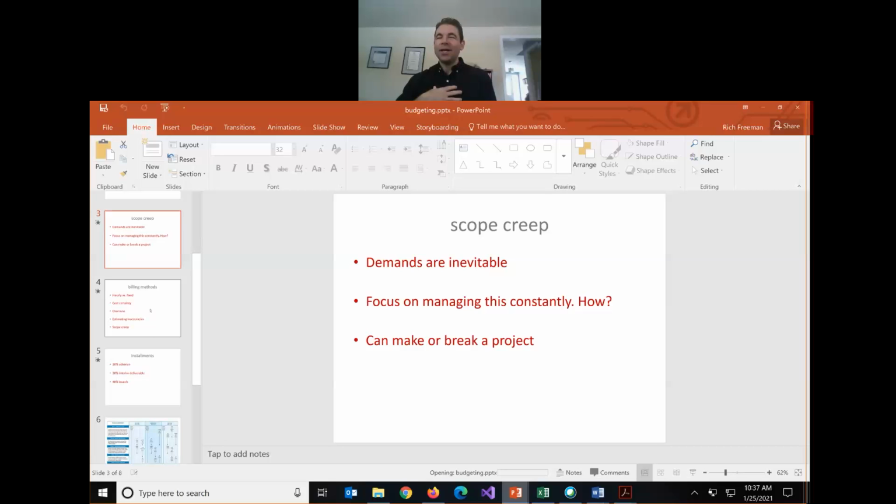Well, my suggestion is I always say yes. You want this? Sure, I'll do it. This is how much more it's going to cost. This is how much extra time it's going to take. Do you want to do this, yes or no? So rarely do I say no. I say yes, but no in the context of the original timelines and original budget. I think of it this way.